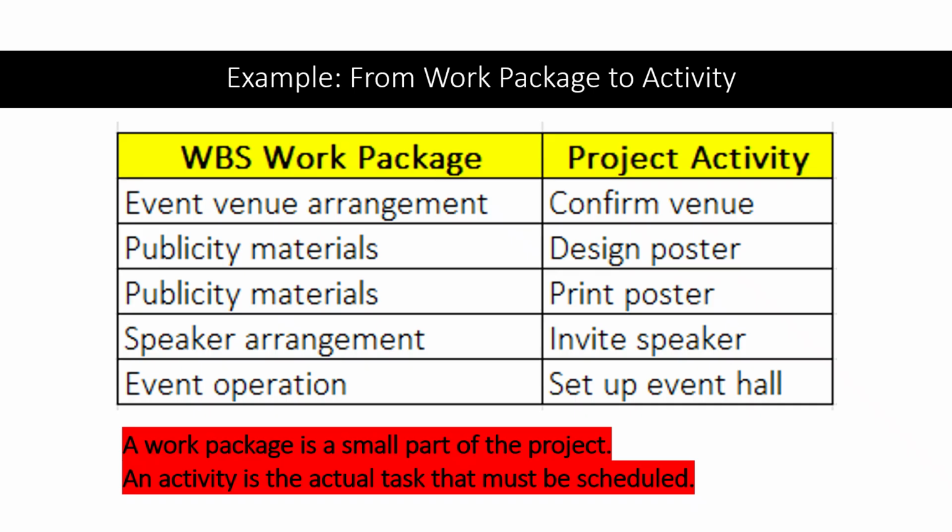For example, the work package event venue arrangement becomes the activity confirm venue. The work package publicity materials can become two activities: design poster and print poster. The work package speaker arrangement becomes invite speaker. The work package event operation becomes set up event hall.